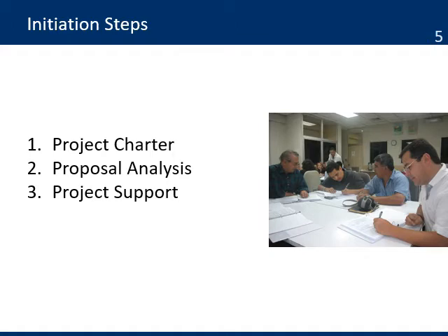The proposal analysis. This is an important task as a project manager. In this phase, you need to have a good understanding of the project, the approaches, the risks, and the assumptions that were made in the design. Make sure all the information from the proposal is complete and is still relevant. It could have been a long time from when the project was designed until it's approved. And in that time, there could have been changes, especially in assumptions.